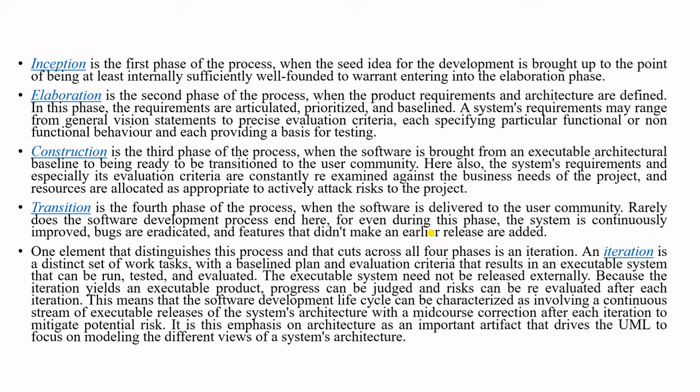Another disadvantage is that the waterfall model cannot be used for projects which have uncertain requirements, or wherein the requirements keep on changing, as this model expects the requirements to be clear in the requirement gathering and analysis phase itself, and any change in the latter stages would lead to higher cost, as the changes would be required in all the phases. Then there is the V-shaped model.